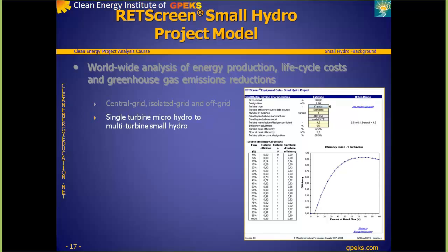A very powerful feature of the tool is a formula costing method that helps estimate project costs based on the characteristics of the site and the project configuration. Of course, the user who so prefers can use a detailed costing method based on quantities and unit costs.